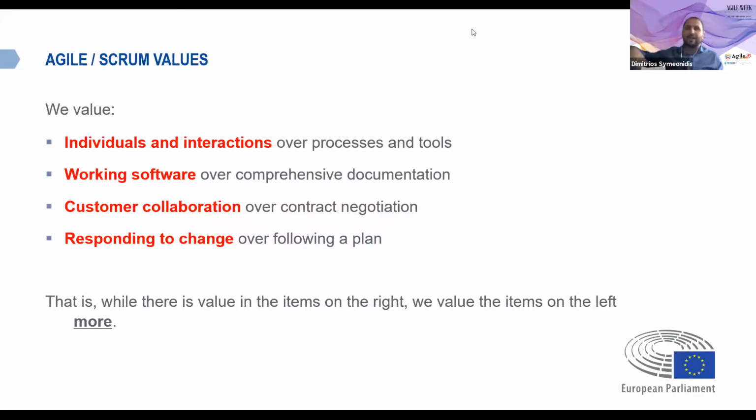So you have this kind of explosion of scope. They ask for it just in case they will need it. Whereas if you build the culture of trust and of agility where you're saying, look, if you're not sure that you need it, don't put it there. You can always ask for it later once you've got the MVP and once you understand your needs better.